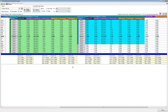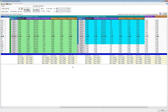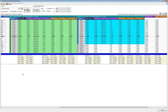Hopefully these tools give you a new suite of capabilities to extract all the information being automatically recorded by GOQ and stored in the SQL database. It's information that's very useful for telling where you're at with a project, how long projects are taking, and being able to use that to propose on future projects. You can look at your budgetary information — set up a project boundary, set up an index, drop in your budgeted effort, and look at your numbers before you even begin to see if they make sense. With enough history, you can evaluate that budget before making your bid on a project.